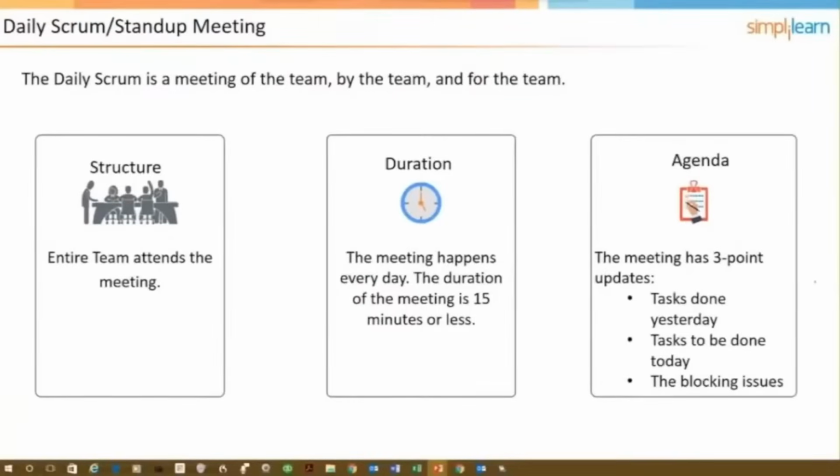Duration, 15 minutes. We talked about that. And the agenda. What did I do yesterday? What am I going to do today? And what are my impediments?